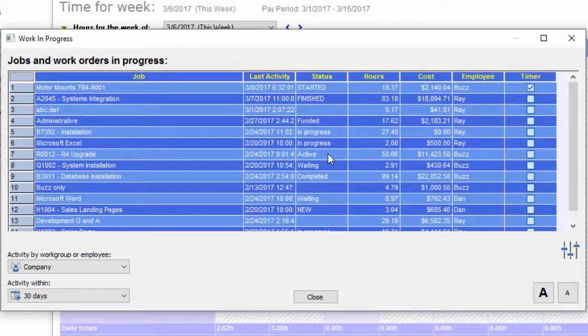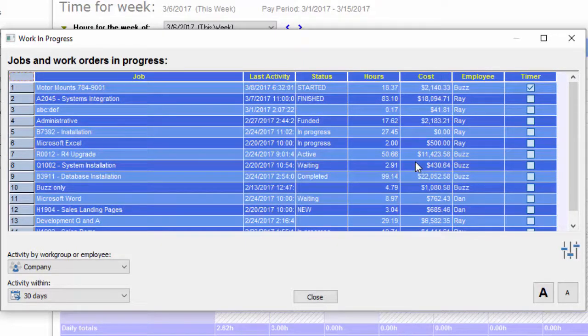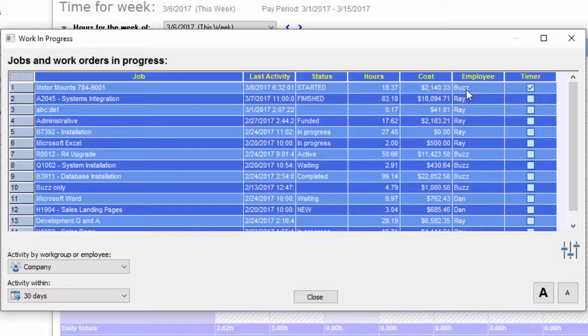Some of these have status indicators like finished, funded, active, waiting, or completed. You can see hours that have been logged, the cost of that project earned so far, and the last employee who touched it.